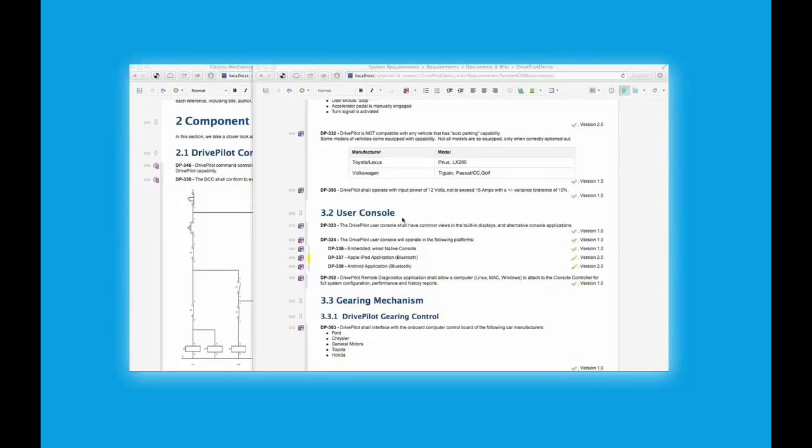Now let's start with traceability. Traceability refers to the completeness of the information about every step in a process. You need to prove that requirements were verified. To prove that, you can show the links between the requirements planned for the release and the test cases executed. To do that, you typically need the links between the requirements and test cases, or between functional and business requirements, as I can show you in this case.